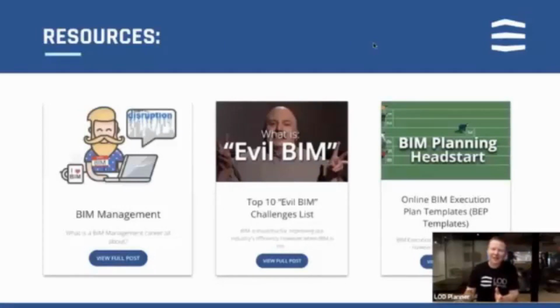And instead of saying, yes, we'll do BIM, and then not defining it, or instead of saying, yes, we'll do BIM, and defining it in every single part of that shopping list that they check everything off, you need to help them focus on 1 or 2 BIM uses that are specifically very useful for them, and help them to define what's required for them to be successful. Because in our industry, we're so attached and so connected with the technology, and we're so happy that we're just going to create these great models that, unfortunately, a lot of the time in industry, you might have an employer that has employers' information requirements that are unfortunately bloated, meaning that they have a lot of things that they don't even need in there, or that they were copied and pasted from somebody else.